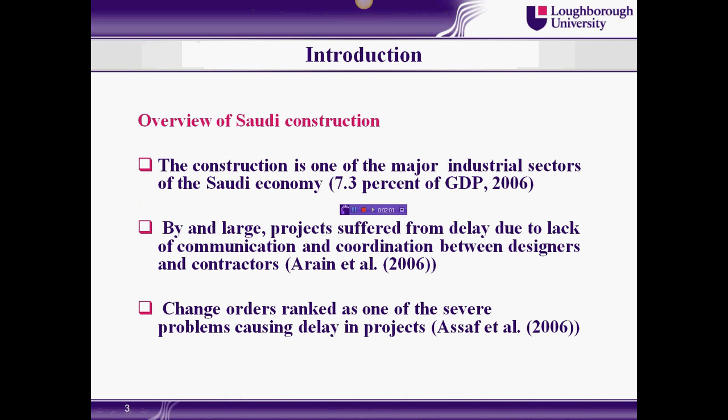The literature identified a number of reasons behind this delay. One of these reasons is a lack of communication and coordination between designers and contractors. Also, change orders ranked as one of the several problems causing delay in construction projects.